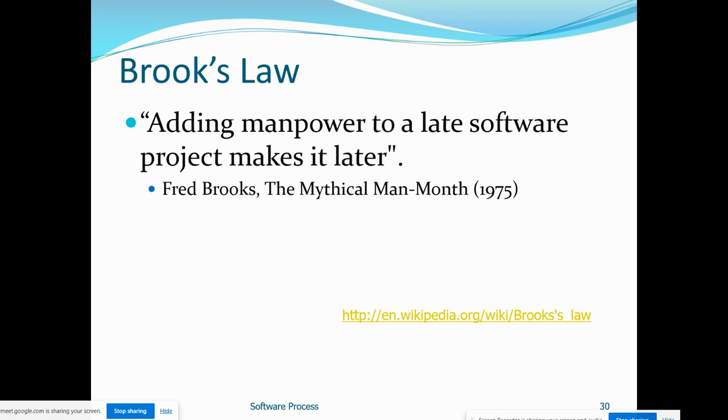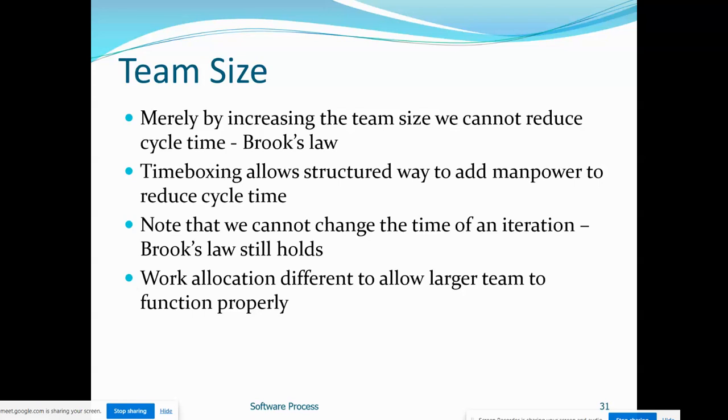Brooks' law. Adding manpower to a late software project makes it later. That's an interesting myth actually. Even if it isn't a law, they will say that it is a myth. By increasing the team size, you can't reduce the cycle time. Cycle time means if I need an input from the previous stage, I have to wait, right?